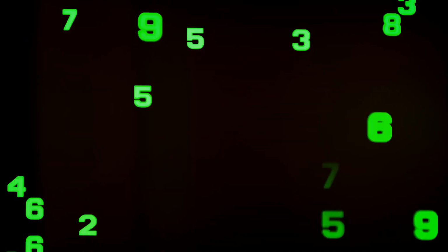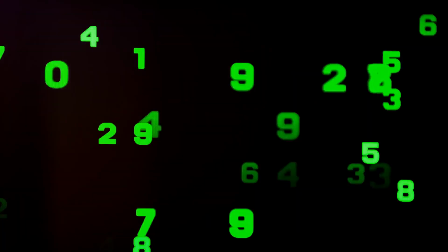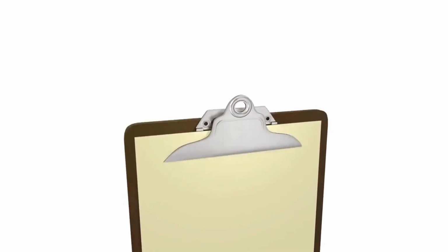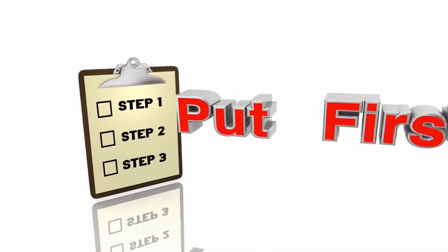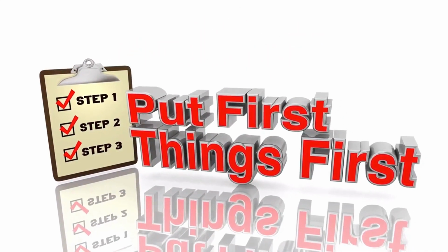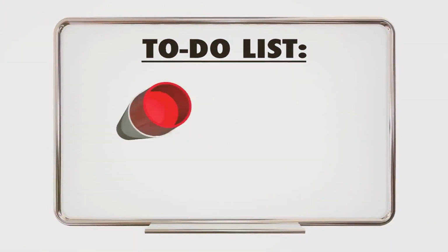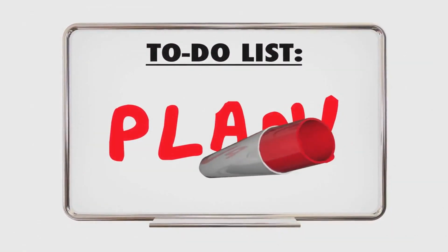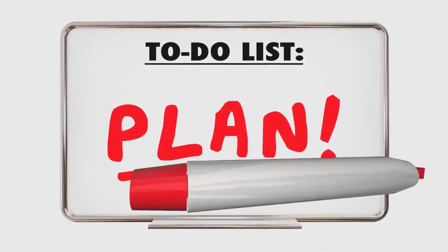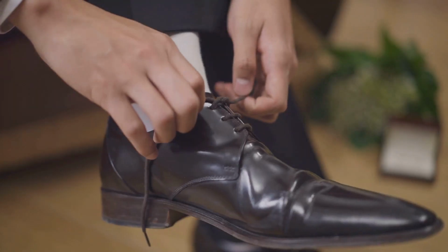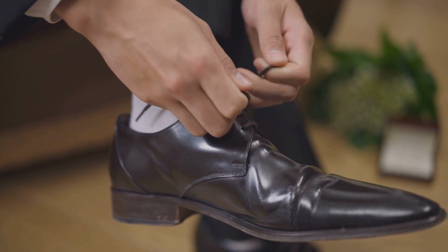But it doesn't stop there. Sequential logic also stipulates that all activities that logically succeed a given activity cannot start until the given activity is complete. So if you have task A followed by tasks B and C, neither B nor C can commence until A is done. It's a logical sequence, a chain of actions where each link depends on the one before it.